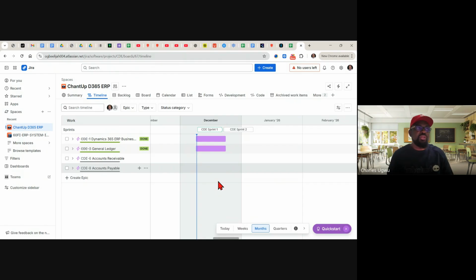is what we call sprint retrospective. That retrospective is when the stakeholders are not going to be involved, it's just the development team, the developers. We come together as a team to analyze our work for the period we've just concluded. What went well, what didn't go well. In a waterfall environment, it is equivalent to lessons learned.